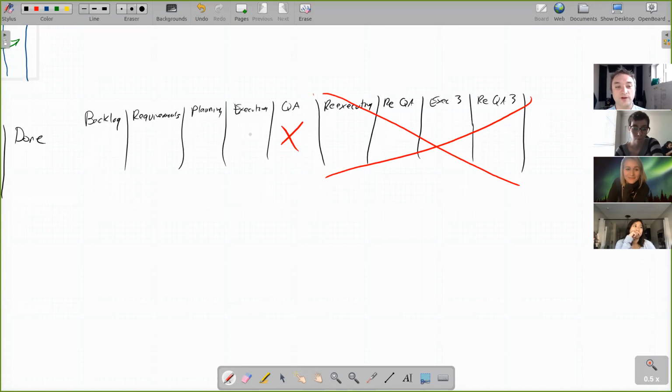So as trying to exploit constraints on this process, you end up boiling it down to the phaseless agile process, where all we have is I'm working on a story, including the requirements and getting the resources that I need. And those resources should be on my team. I don't need to requisition them from another department or something. It's part of agile team composition. So I have those people on my team.